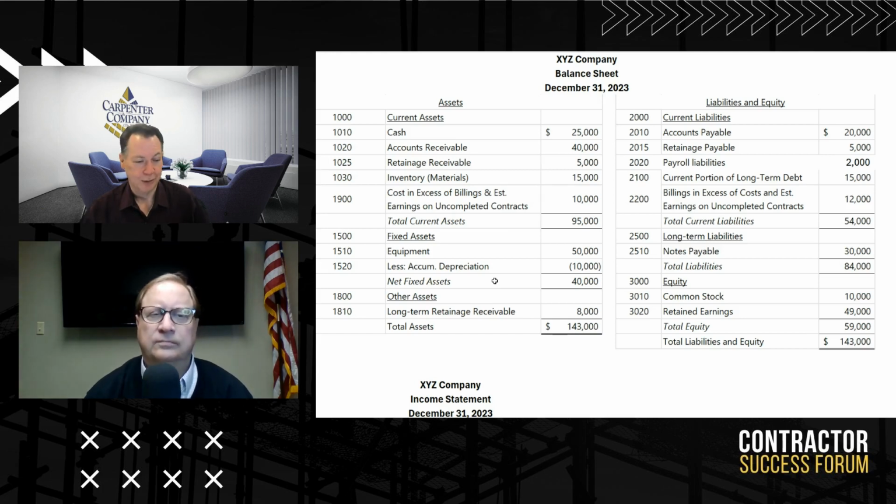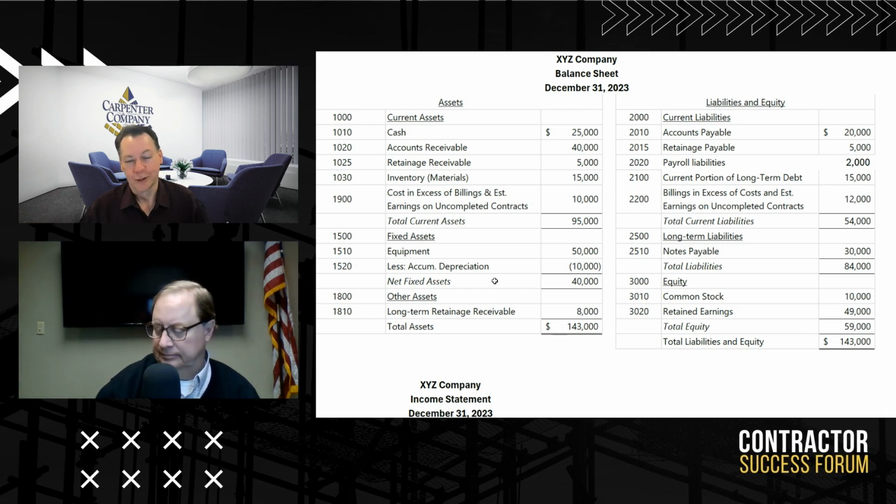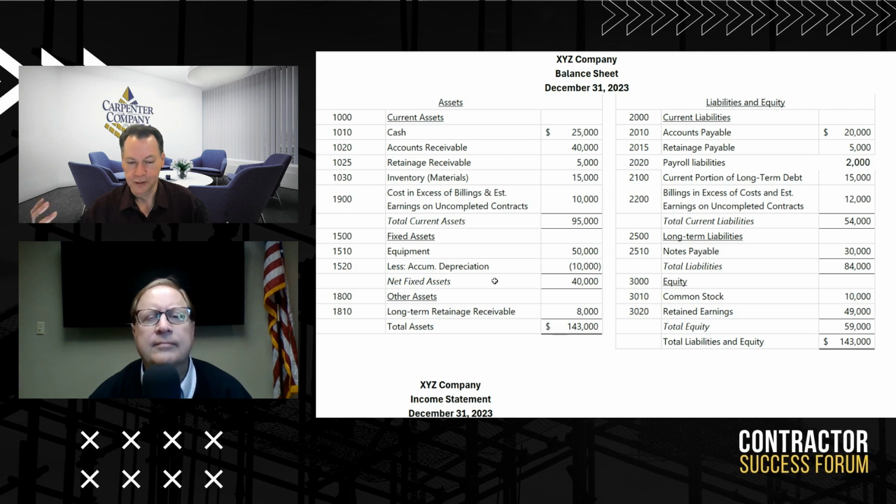Other things like inventory, I don't even usually like to bring up inventory because most contractors don't really have it. But what you will see on the QuickBooks chart of accounts is they will come up with something called WIP, or work in process. And nobody knows what that means. The people that set up the QuickBooks just have a generic account that gets thrown in there. And this type thing where we're talking about costs in excess of billings and billings in excess of costs are measures that you would see if you're trying to do percentage of completion basis accounting, and it's an adjustment to revenue. And we're also going to have an offset in our income statement section to where as that gets adjusted, it's going to go here. I typically will break this out in the income section to where you have billings and you can tie back to that billings number. So that's just another thought with this.